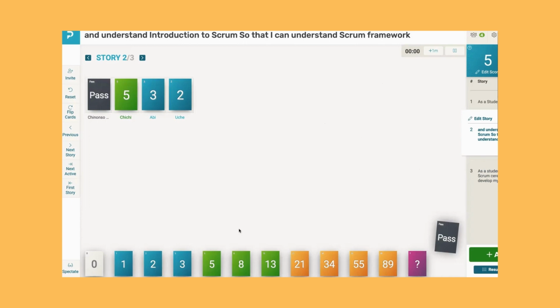So you can say each story, let's say you need to estimate like there's 10 stories. You put 2 minutes, that's 20 minutes of estimate. And then there may be some questions, that team member is confused and he can put this question mark that he still has questions about it, right?